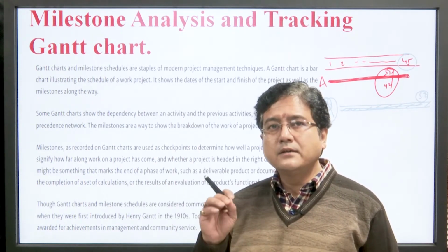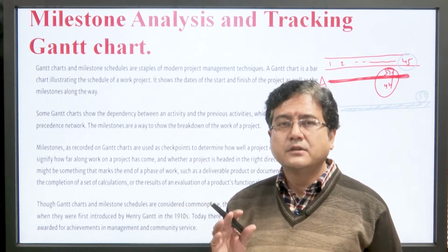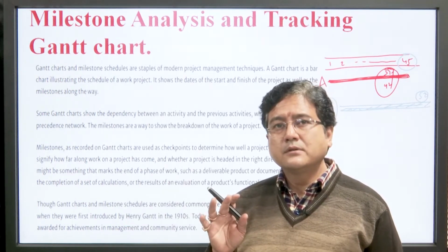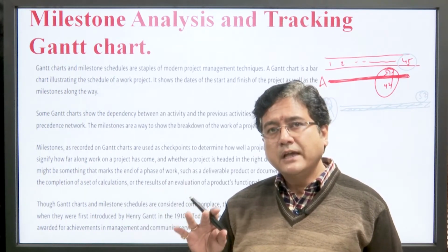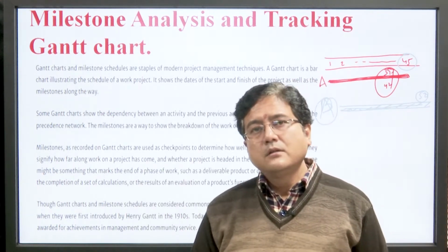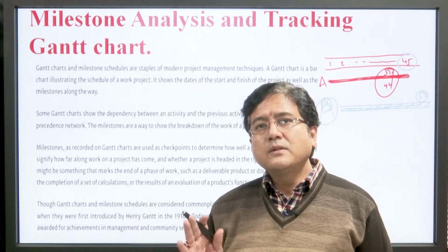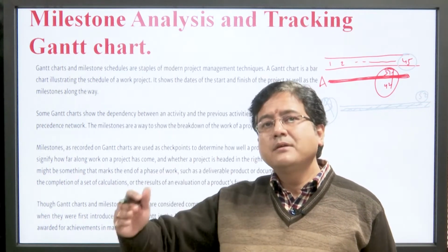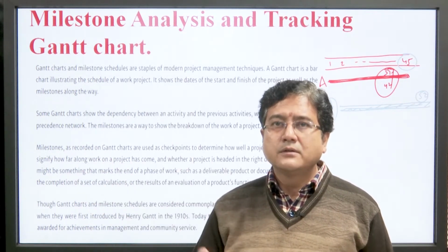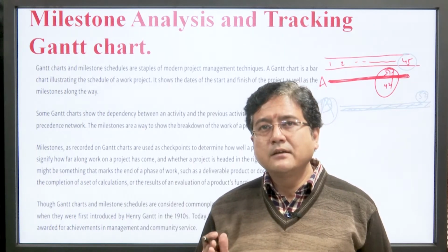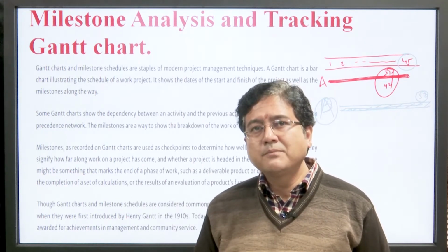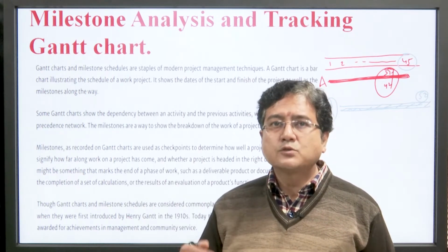So, it is an intimation, a kind of alarming situation. If the project manager is still not aware of it and not able to control it, these 7 days can increase to 21 days, 1 month, or 2 months of delay by adding on. When one step is delayed by 7 days, it is possible that the next process B may be delayed by 14 days, and so on.